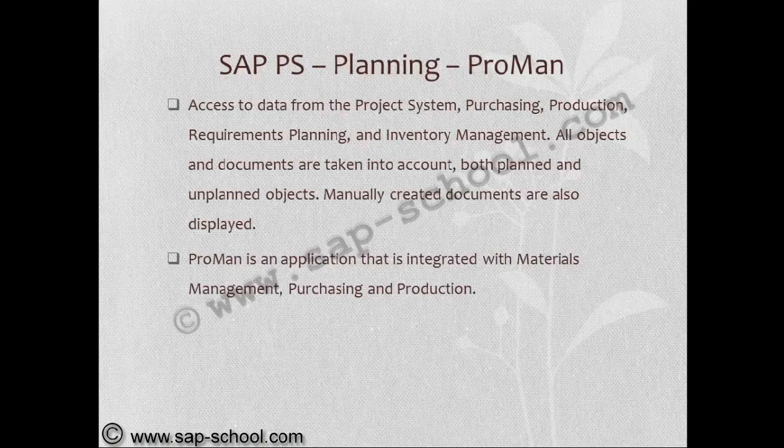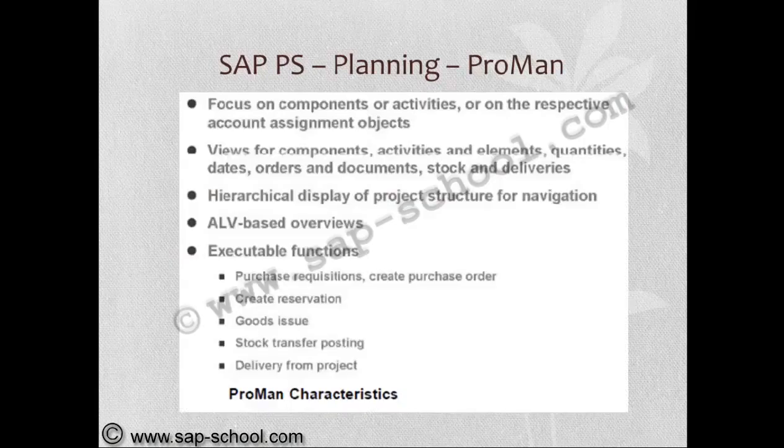Proman is an application that is integrated with materials management, purchasing, and production. Now focus on components or activities, which are the respective account assignment objects. It has views for components, activities and elements, quantities, dates, orders and documents, stock and deliveries. It has a hierarchical display of the project structure for navigation, ALV-based overviews, and executable functions like create purchase requisitions, create purchase orders, create reservation, goods issue, stock transfer posting, delivery from project. These are the characteristics of Proman.